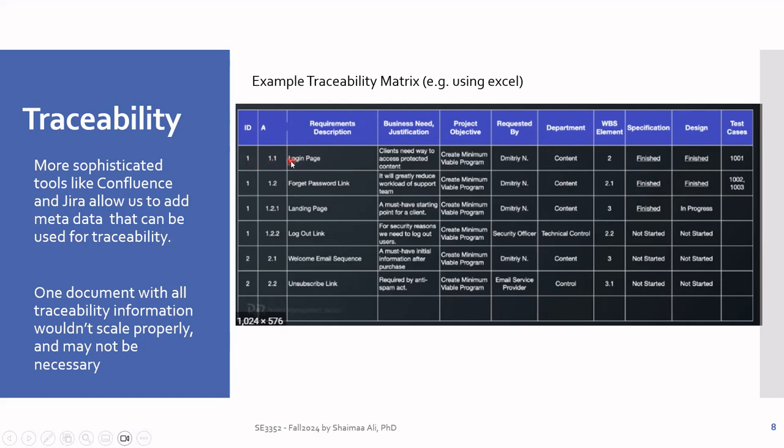You see there are numbers and sub-numbers. And then keep track of all that is going to be built on top of these requirements as you go. Now, we have already established that requirements may change over time. So it's very important to know what was built on that requirement so that when it changes, we know what needs to be updated in the next stages.